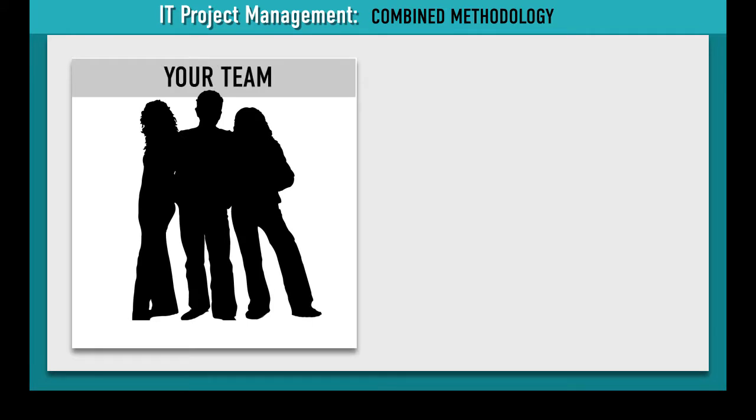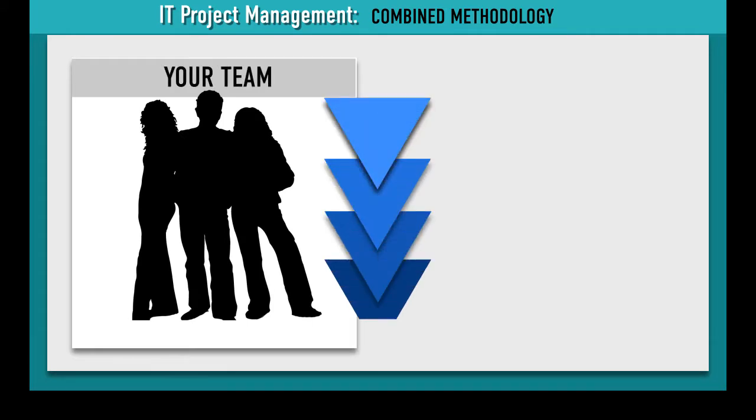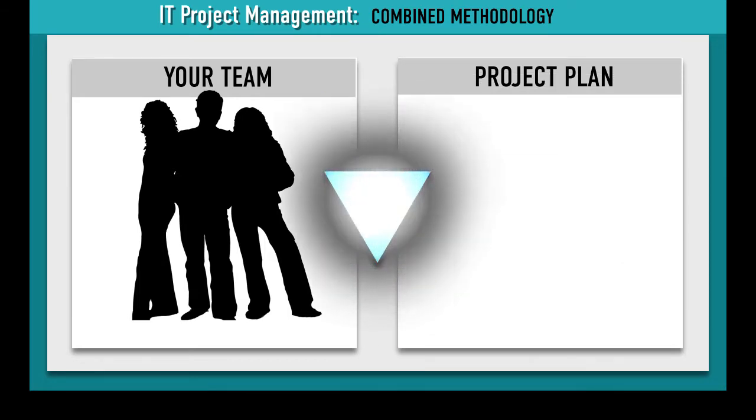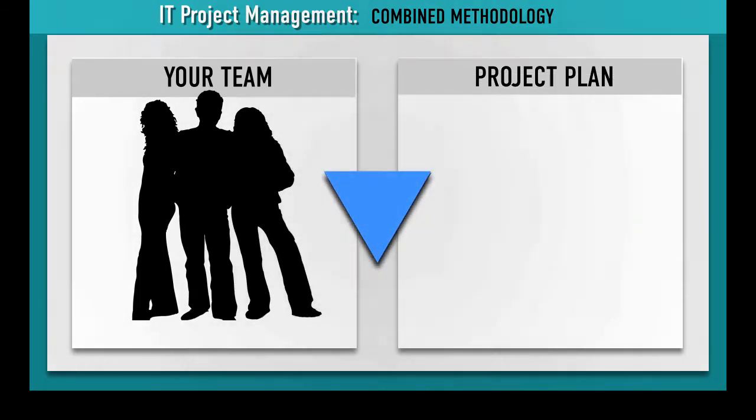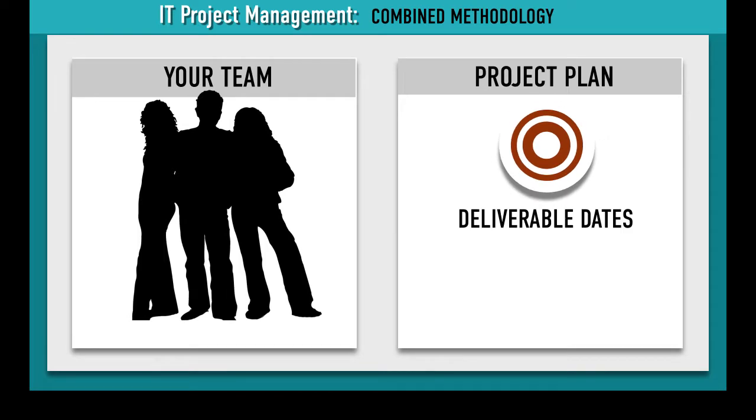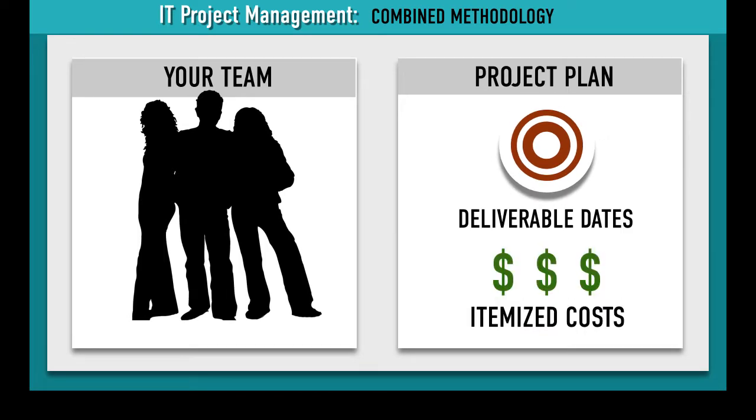they use the traditional Waterfall methodology to create a project plan for Daisy's dog walking software. It identifies target deliverable dates as well as itemized costs for Daisy to review and approve.